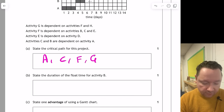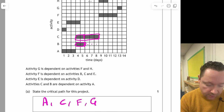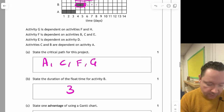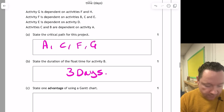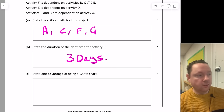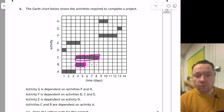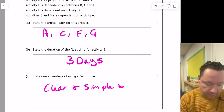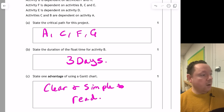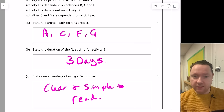State the duration of the float time for activity B. B and C are happening simultaneously. B takes two days, so there are three days left over before C finishes — the float time is 3 days. Make sure you put the correct units in. State an advantage of a Gantt chart: it's clear and simple to read. Another option: it's easy to see the float times from the bars.